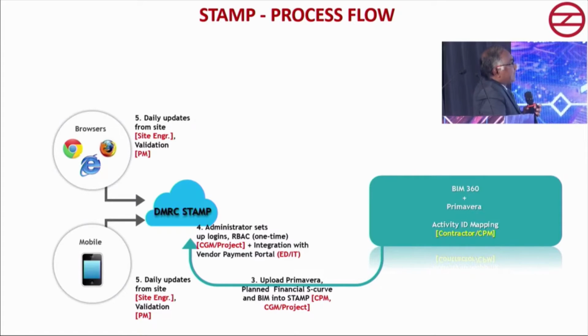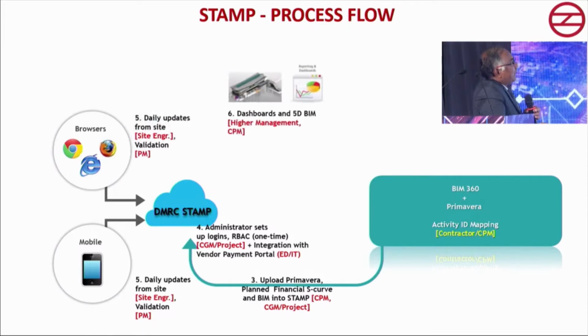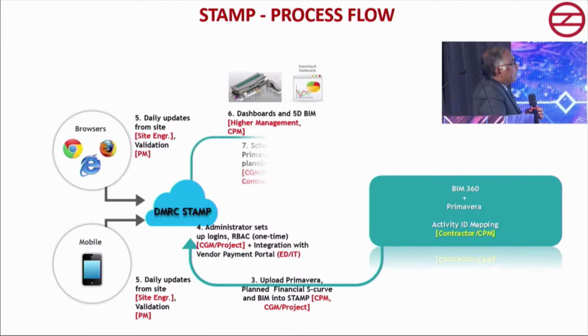Then we have created a validation system. Whatever progress is being updated, whether it is correct or not will be validated by the PM, like in DMRC, on a weekly basis. Everything you will be able to see on the dashboards as well as on the BIM models.